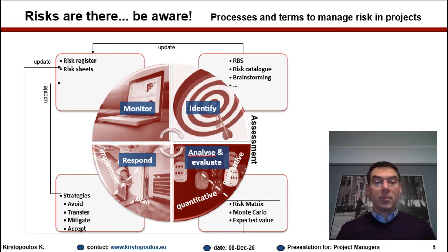And this is very, very important. For as long as you have not done the response, the risk is still there, and it has exactly the same level as before you identified the appropriate responses. The last process in the risk management overall process, the last sub-process, is monitoring.